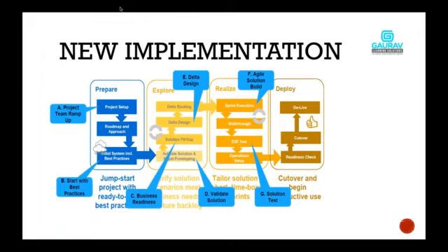The third one, in the preparation phase itself, is that you need to finalize the system. You need to arrange for the cloud trial version, which already has the best practices installed. So you can see, start with the best practices. Once you have all these things ready, you have a team ready, you know the roadmap, and you have the system which can be used for demo purposes, you will enter into the explore phase.